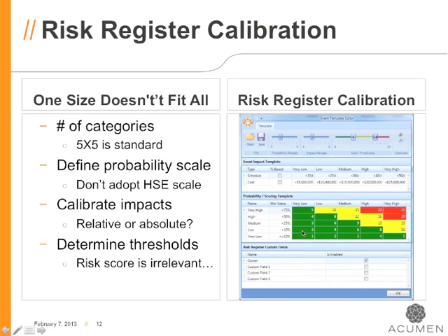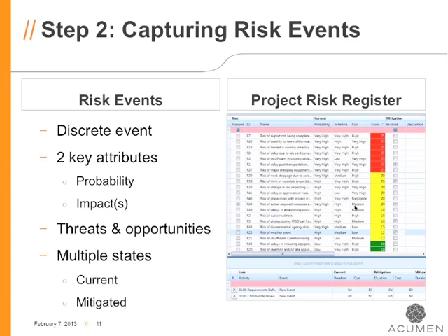Again, I would throw out the comment that you actually have no idea whether a risk that ranks highly in a risk register is truly going to have an impact on either your project schedule or your project cost without running your risk analysis. To give you an example, if a risk event has a potential of maybe a 6-month delay, is that high risk to first gas? Well, you might think yes.